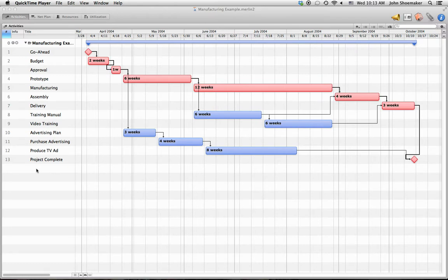On the screen here, you can see I have a very simple project. I have a few reservations here. Let me explain those very quickly. First of all, over here on the left, this is not a work breakdown structure. Okay, there's nothing broken down here. A work breakdown structure has multiple levels, starting with the project, the sub-projects, several layers of sub-projects, and then finally work packages. Essentially what we have here are work packages, but these are way too broad. They don't meet any of our guidelines and they need to be broken down further.